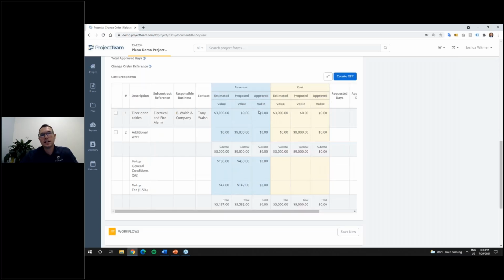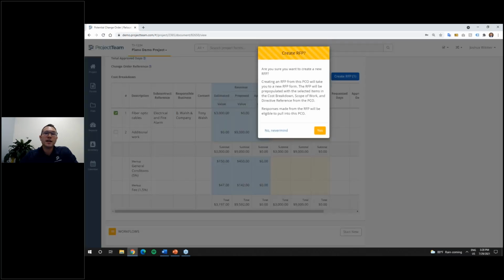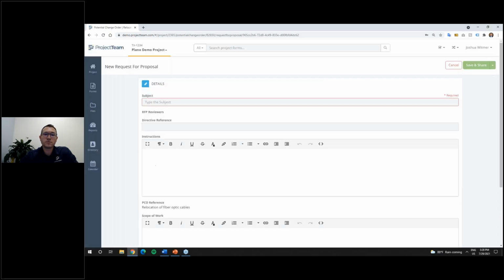Alrighty, so let's say I do have this PCO now. I do have this line item 1 here is talking to this B. Walsh company. I am estimating that I have about $3,000. I think it's going to cost about $3,000, but I'm not really sure. I don't want to make an assumption, of course. So I'll go ahead and check the box next to that line item and create a brand new RFP to actually ask that Tony Walsh what his number actually is. So I'll go say yes here.